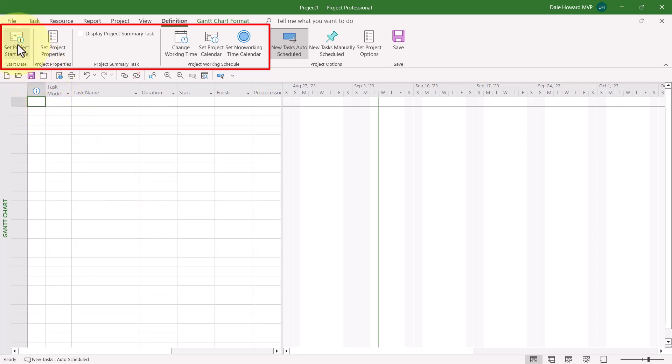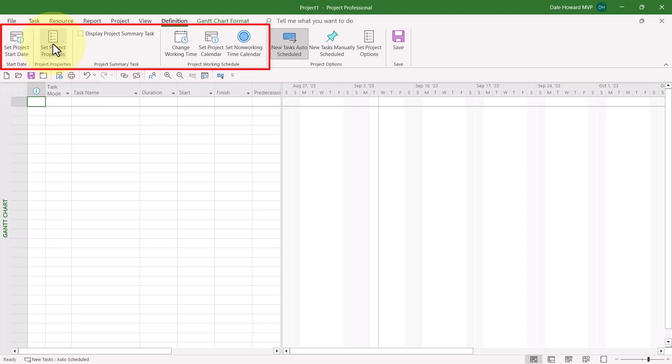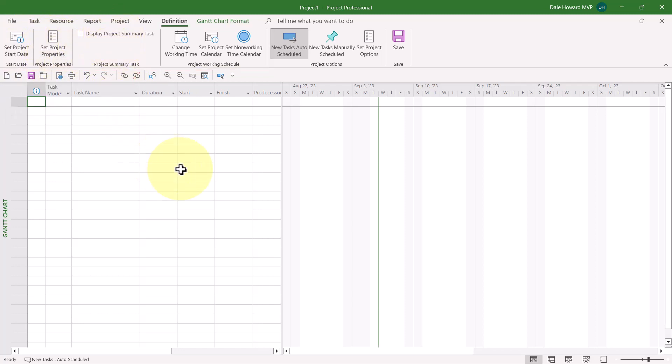You'll find steps like setting the project start date, setting the properties, displaying the project summary task, and so forth.